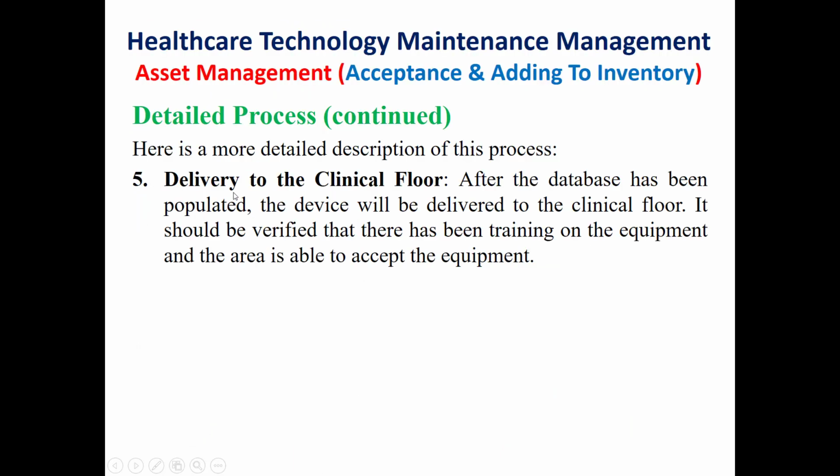The last point is the delivery of this medical device or system to the clinical floor. After the database has been populated, the device will be delivered to the clinical floor. It should be verified that there has been training on the equipment, which is very essential prior to use on the patient, and that the department is able to accept the equipment.